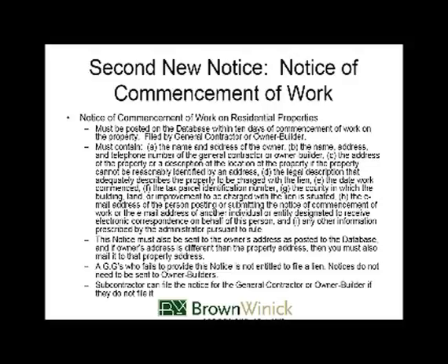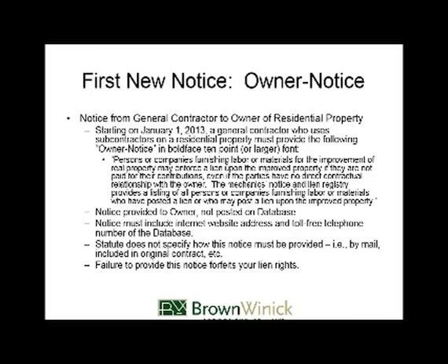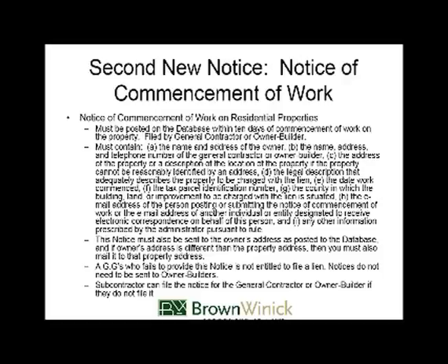So again, the point of the first notice that we talked about, that I'll click back to, the owner notice, was to put the owner on notice that there might be liens. The second notice is the same thing. Listen, we're getting started. Here's some people. Here's the notice of commencement of work. We've got people coming onto this project. Again, it notifies the owner that work is starting and liens may be something that could get filed. It tells them some specific information about who's doing what, and they can track that better as an owner.